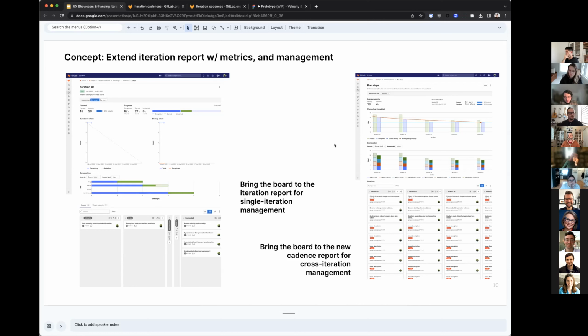That's another area people usually ask about when I've shown them this: how can I see what was planned, meaning I put it in the iteration before the iteration started, versus what was completed? That's the big pain point with all of this. I planned 20 and then we completed 20, but it might not have been the same 20. We left some things on the table because other things got added mid-flight. People are basically hacking this. One person said they use incidents literally just so they can look at this and see, oh, these two are incidents, that means we added it after the fact.